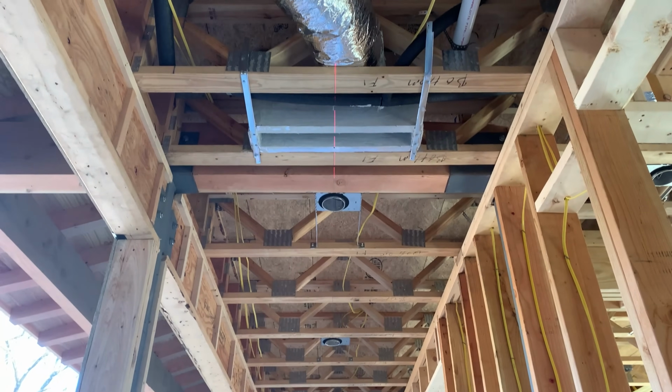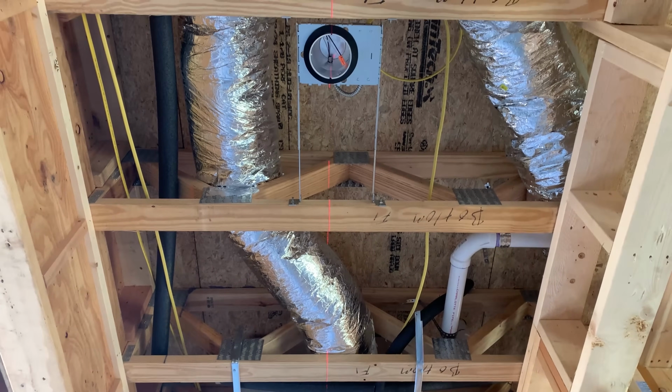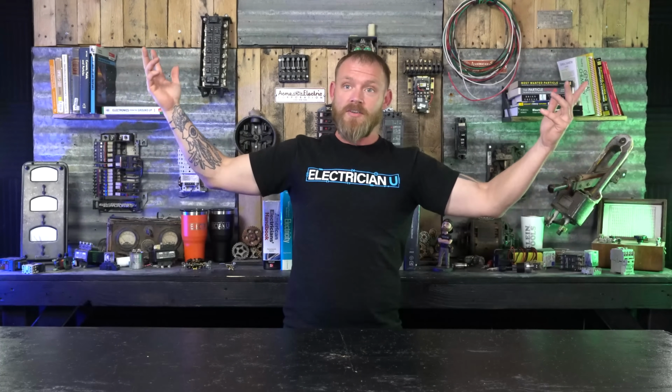That way, if there's an issue, I can tell the builder, hey, I have all these lights. This is the only way these lights will lay out because we have framing constraints to think about. So it's going to be much easier to move these two little vents and push them over a little bit than it is to re-engineer the framing just to get all of this lighting correct, or deviate from the lighting plan so everything looks all goofy. So I just like to wait for the end, then I like to come in and start doing all of my wiring.